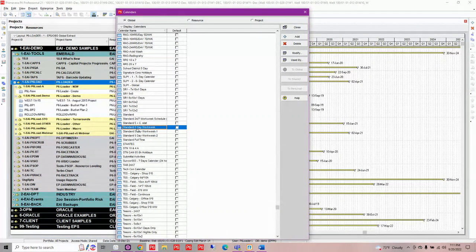However, that doesn't mean that how this calendar is set up is the same as the calendar that was either delivered or that you're importing in. What can happen is if you are importing a standard 5-day work week calendar in, it's going to overwrite how your calendar was defined. So to be able to push those down to the project level is really very smart and useful.